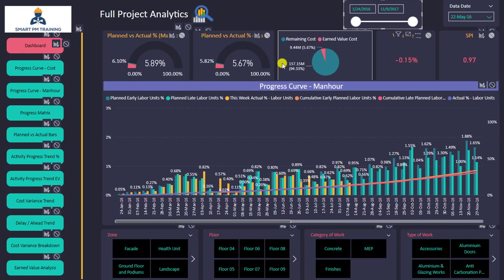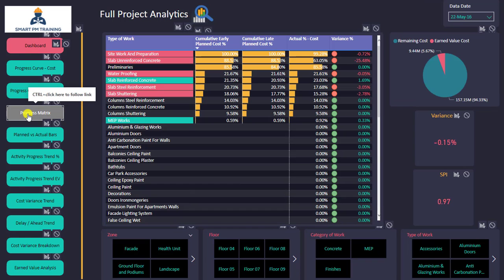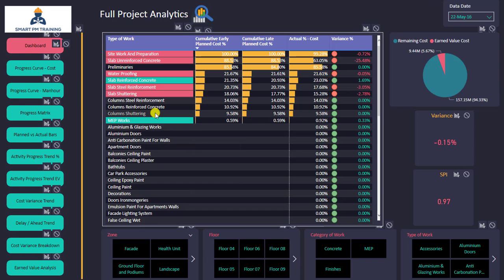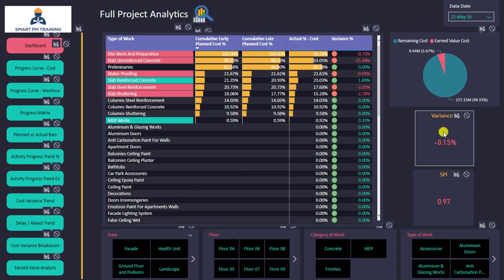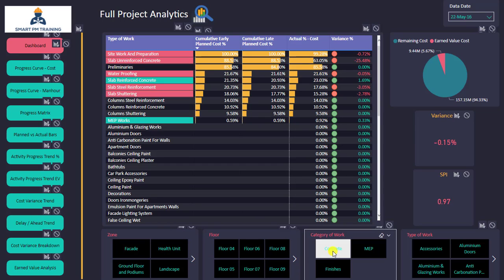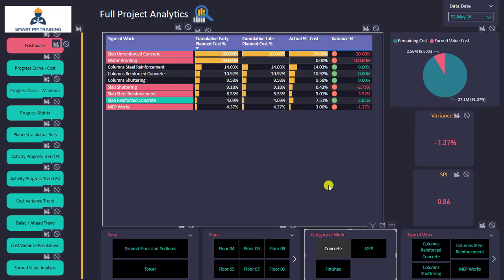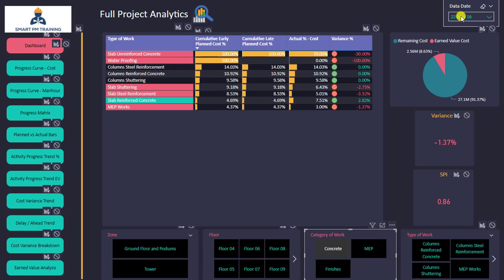I can also do the same level of analysis but based on man hours — it's the same layout but everything is based on man hours. I can go to the progress matrix and see the list of activities for the whole project: planned versus actual, variance, and the same indicators for earned value, variance percentage, and SPI. I can also choose concrete to filter only those activities.